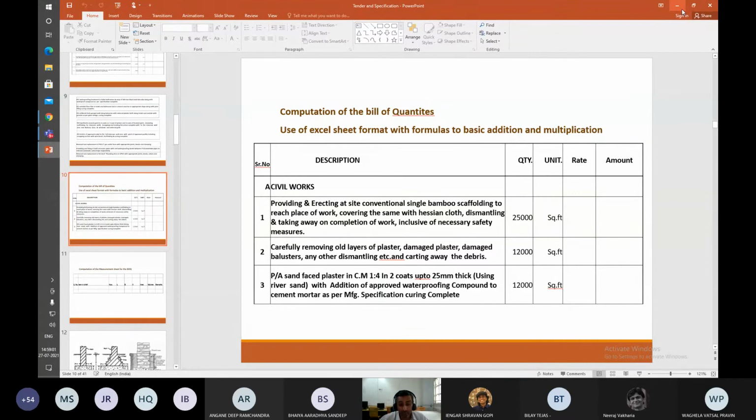So you usually do something like a shuttering, but it is called, what do they do in the gutters to keep the gutter? That's a nice word. It's not embankment. It's a kind of shuttering they do to make sure that the mud does not fall off, that is one aspect. Okay, I'll get the word and let you know. The other is that you do dewatering. If you go 3.5 meters below the ground, you are bound to get subsoil water there, so you have to do dewatering to keep the foundation area dry, so that you can then lay your foundations.